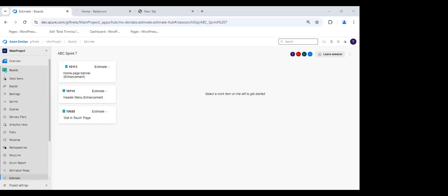So remember, the first ceremony is the sprint planning, where they plan for that sprint, a 2-week sprint. And I also told you that it could be 1 week, it could be 4 weeks, but for this one, we're using a 2-week sprint. So they are planning now. Once Bola comes on, they are doing the planning for the next 2 weeks. So all the things they want to take in, but they are just trying to combine the refinement a bit with the sprint planning because of time. That's the only one they'll combine. The others, they'll do as standalone.